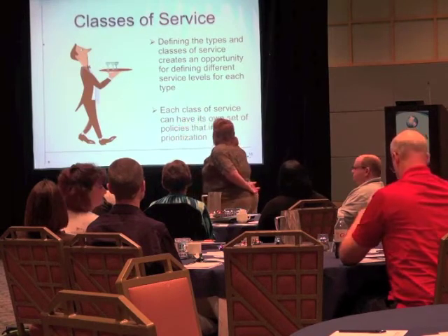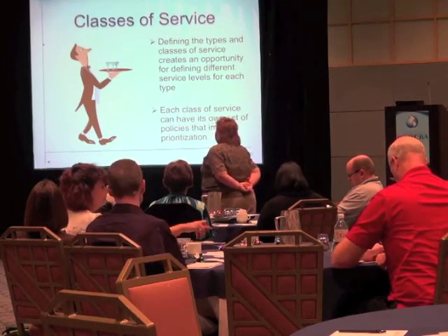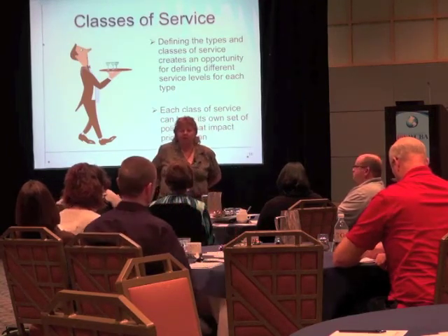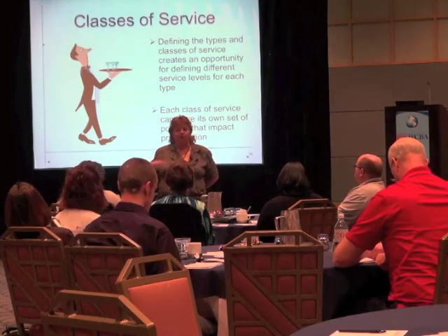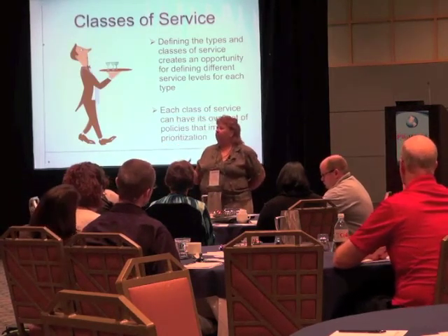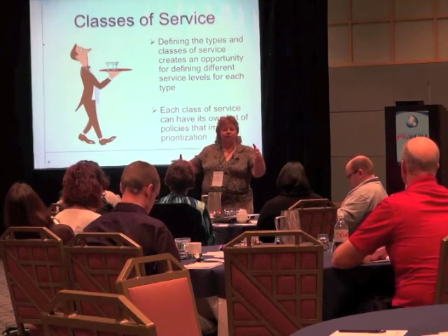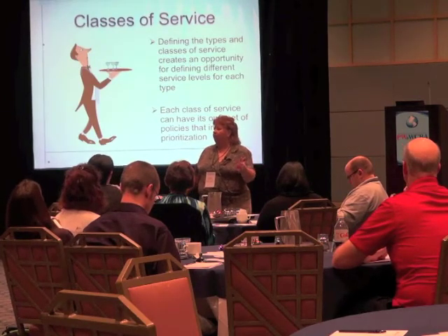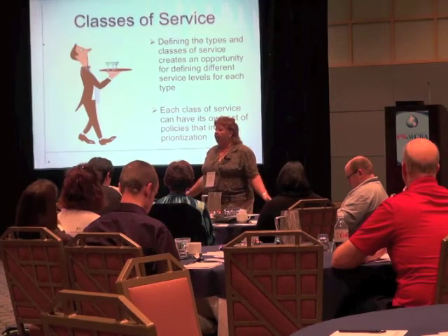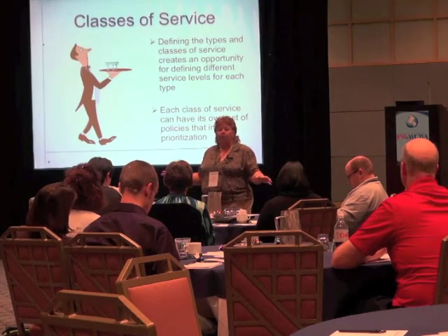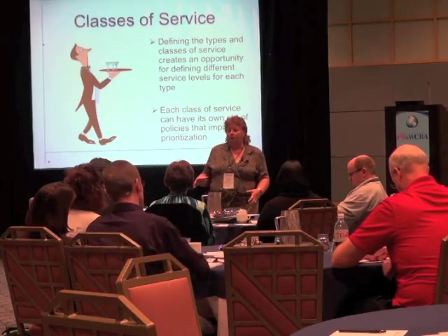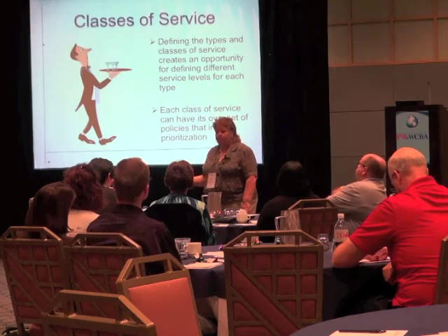I want to talk about something a little bit different: classes of service. Classes of service, to me, is something you generally get to not when you first pick up Kanban, but as you start to mature. You find that it's becoming very tough to have everything of a similar size. Let's say you pick that arbitrary 4 to 12 hours as your similar size model, and then all of a sudden R&D comes out with a brand new thing, and the problems are much bigger. We've got bigger issues to solve, and it's not going to work well. Perhaps classes of service works there.